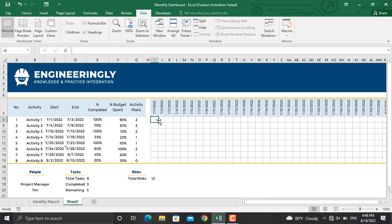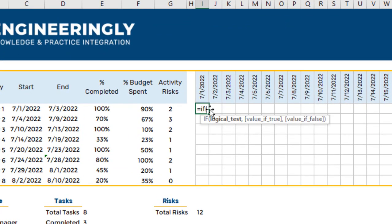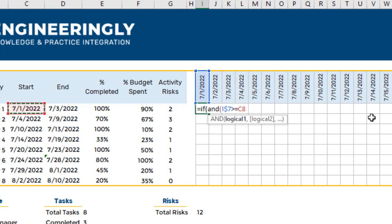Next is the Gantt chart. To prepare the dynamic Gantt chart I will use the IF and AND functions. I'll write equal sign, IF, open parenthesis. Since we are using two conditions, I'll use AND. For the date cell in the header, I'll lock the row number with a dollar sign so it doesn't move when dragged down. The condition is: if the value is greater than or equal to the start date — for the start date I'll lock the column since we'll drag to the right.